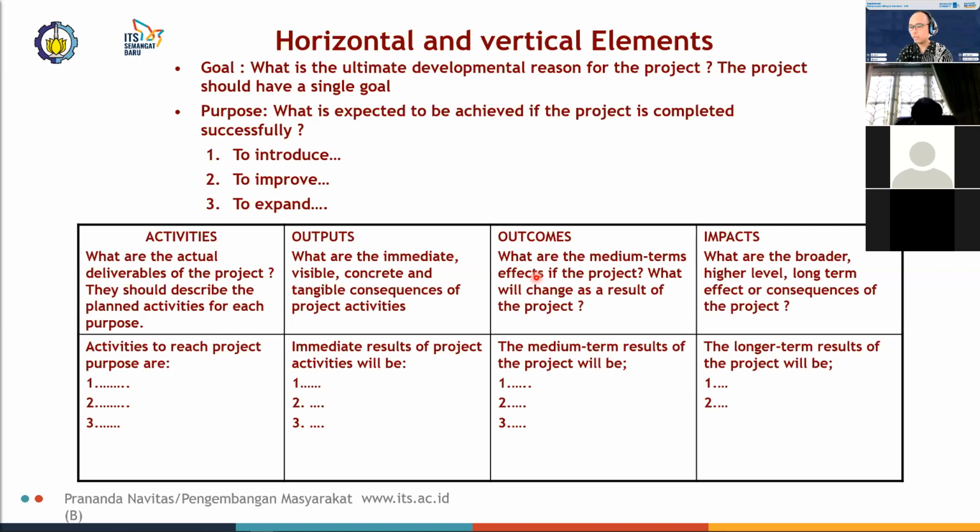So in terms of the community library illustration that I keep coming back to, you already know that the ultimate output would be the community library itself, but perhaps the outcome of the community library would be, say, the medium term effects, a 5% increase in literacy, and then the impact would be a 100% literacy rate among adults within a community.